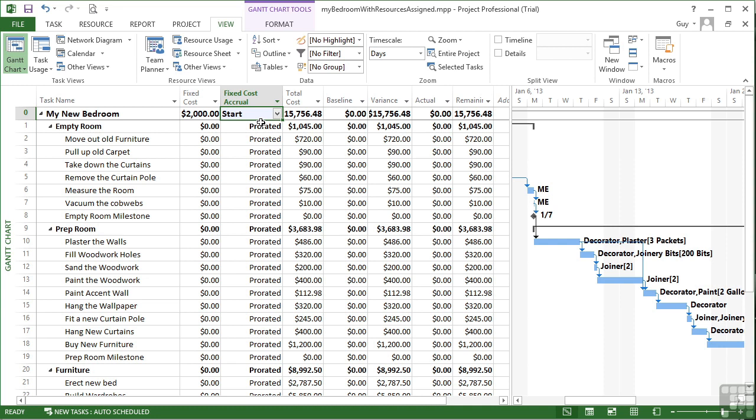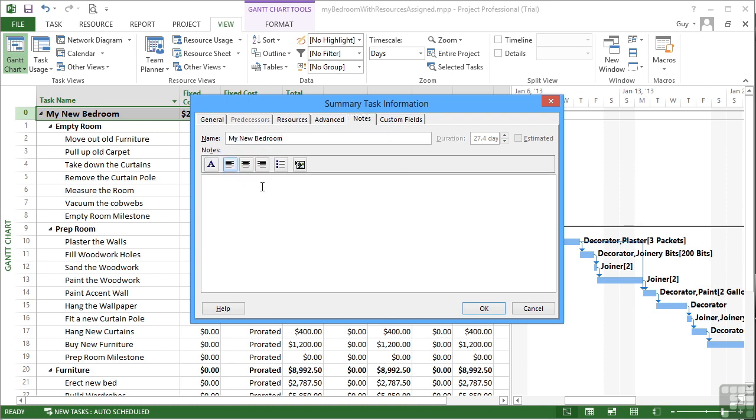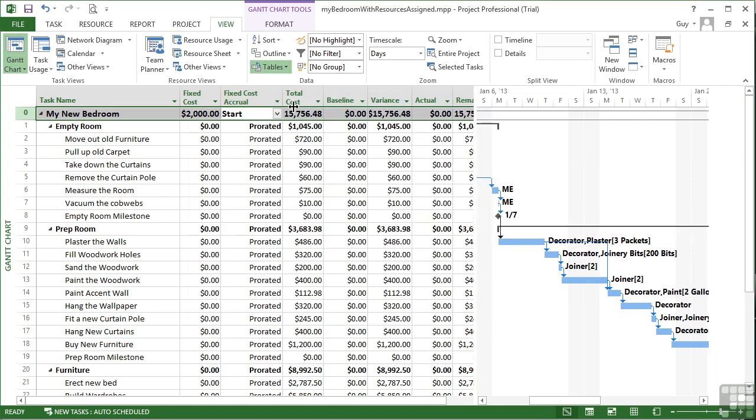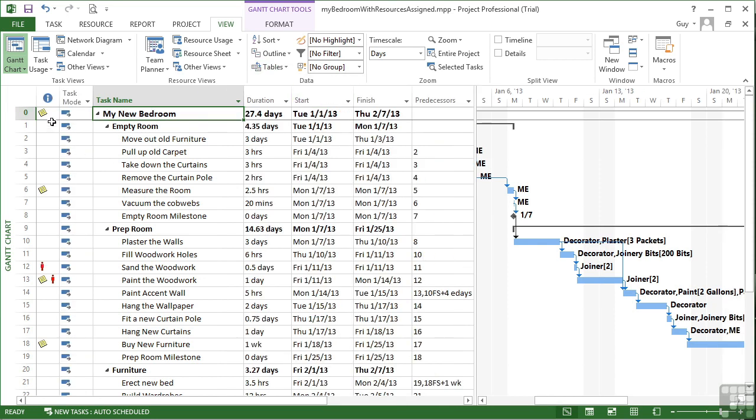What is it for? It's just a fixed cost. So to explain the $2,000 fixed cost, we're actually going to open up the task information box and go to the notes and add a note to explain that $2,000. $2,000 fixed cost is our contingency. So that's the money we've put aside to cover unwelcome or unexpected costs. And by adding a note in here, I will get a little post-it note in the indicator column which I cannot see here. But when we turn back to our entry table, I see I have a little post-it and I can hover and the $2,000 fixed cost is our contingency money.